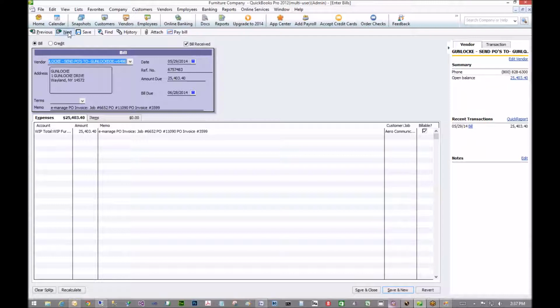If you choose to do our automated WIP, it's going to go into WIP as an other current asset until you invoice the customer. For whatever percentage, if it's 100%, it's going to recognize all the cost when you do the invoice. If you do 30%, it's going to take 30% of the cost and recognize it with that 30% of the income. Okay. Right. That makes sense. Yeah, that's what we would expect.